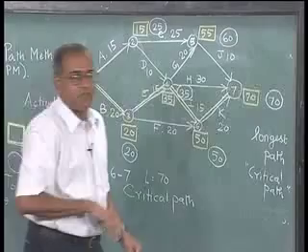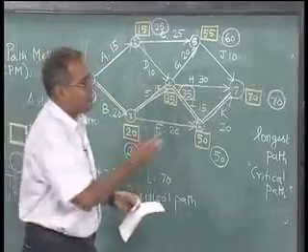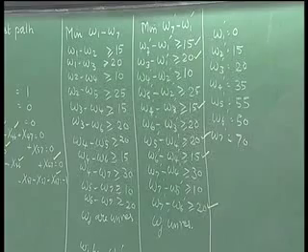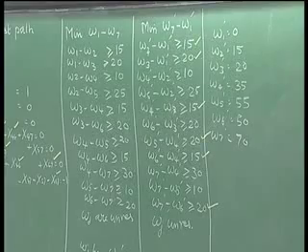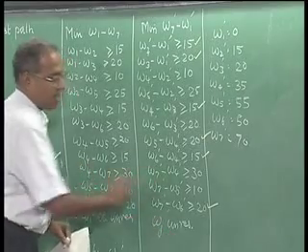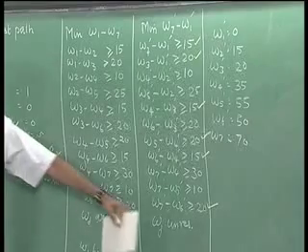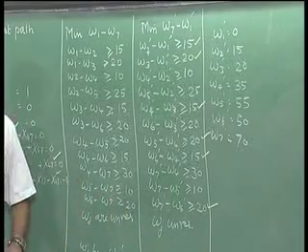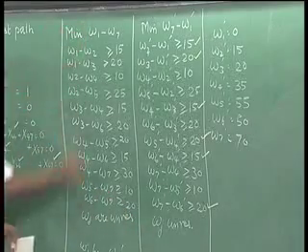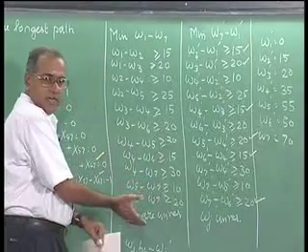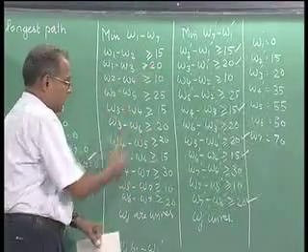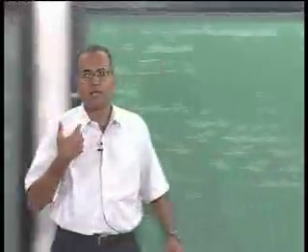we could come back and get the backward pass labels. In fact, if you remember very carefully, we did a very similar analysis for the shortest path problem. We also mentioned that we could write the dual this way, and then we mentioned that if we write the dual this way, we get the forward pass, whereas if we write the dual this way and move from W7 equal to 0 or 70, we would get the backward pass labels.